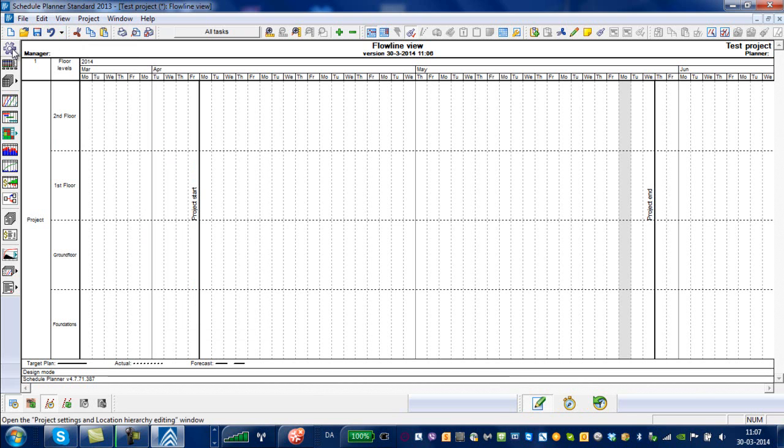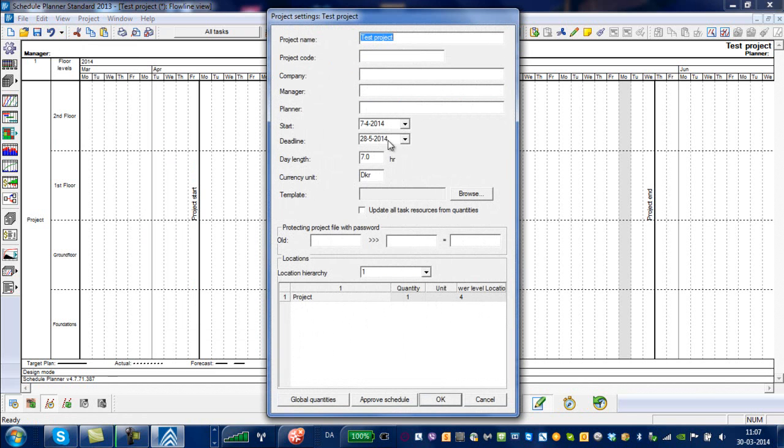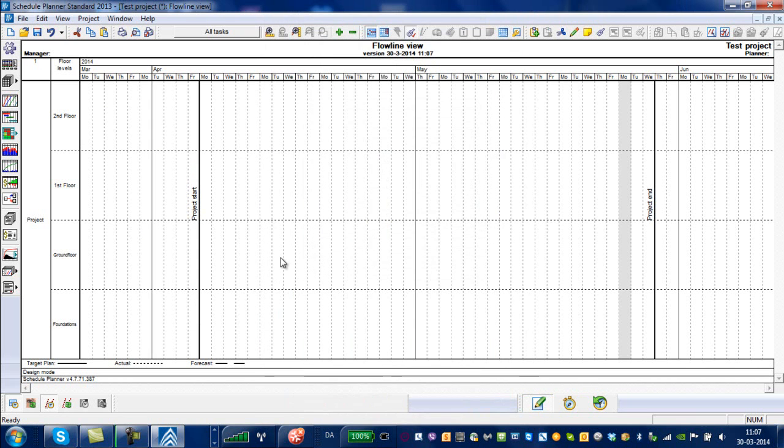And if I want to change the date, if I click on here, I can change both the start date, and also the actual name of the project and other important characteristics. Click OK to that again, and now I'm ready to schedule or to plan. And it's important when I'm planning to be in the planning mode in the first place. If I click on here, you can see I'm in the planning mode. This would be like in MS Project, where you are in the control mode, where you set a baseline, as it were, and start to follow up.